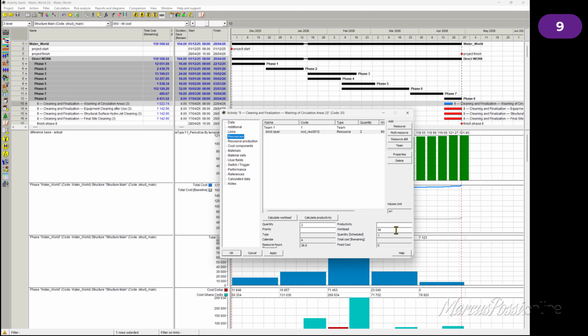Resources here may be classified, may be included with workloads and productivity information, but they won't be considered in CPM calculation because we are using just fixed duration type activities. Okay for you? Was that clear?